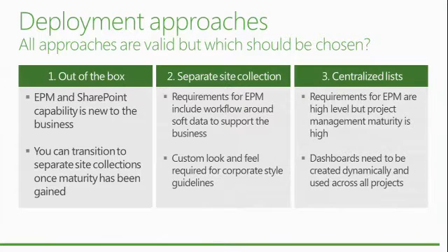And if those standard fields don't match what you need to meet your requirement, it won't bring through any custom fields unless you extend that cube yourself. And if you know anything about SharePoint development, they don't actually allow you to go into the content database anyway from a supportable point of view, which makes things very hard. Which is really where approach 3 is born out of. So, thank you. Good question.